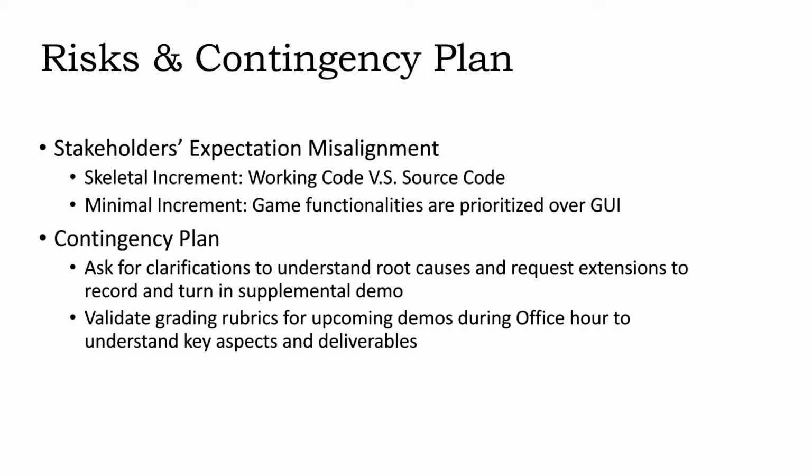In light of the realization of the risk, the team outlined a new contingency plan to avoid similar mistakes in the final deliverables. When our mistake was brought to our attention, clarifying questions were asked to obtain an exact understanding of what was needed for each project component, as well as agreement on an updated timeline. Mirroring this response, asking for clarification either in office hours or via email when multiple interpretations of rubric requirements may exist will help us prevent any further delays.